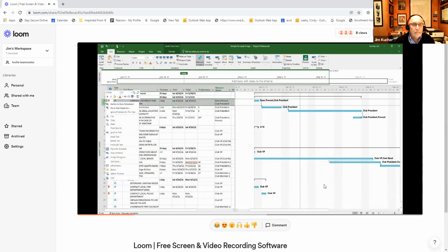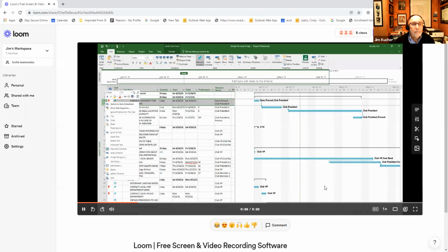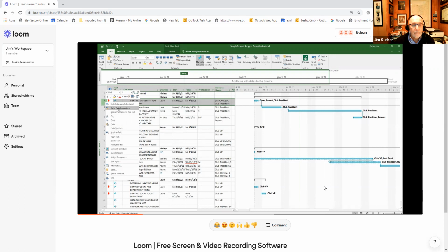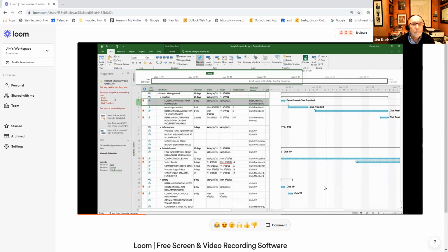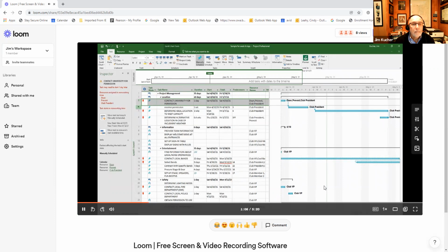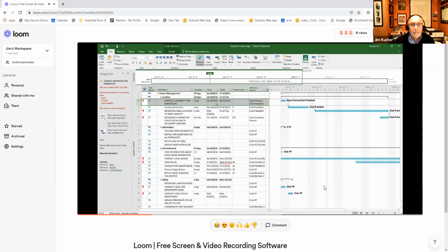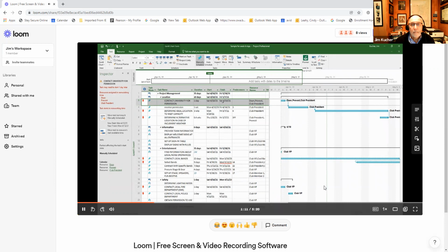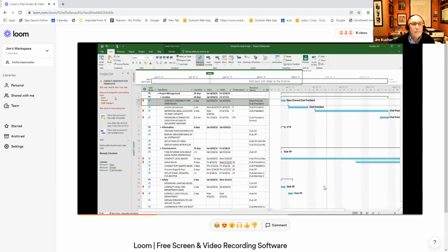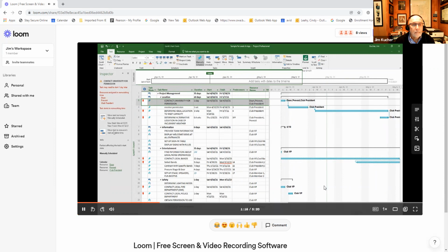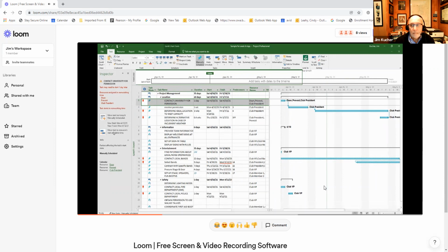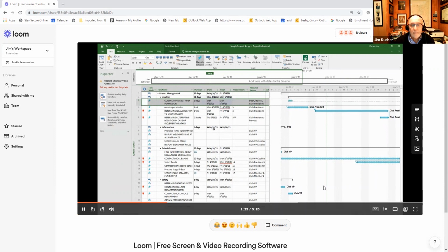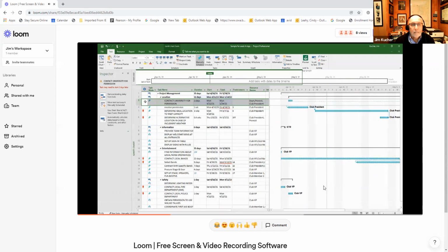If you right click, you will open up a dialog box that allows you to fix the overload in Task Inspector. Open that Task Inspector and it will tell you what's wrong with the task. In this particular case, what's wrong is that it starts on a Saturday, and we assume that the dean and the provost don't work on Saturdays. So we go down here to the option that says move task to resource's next available time. We click on that. It reschedules the task until Monday, and it removes the resource constraint.